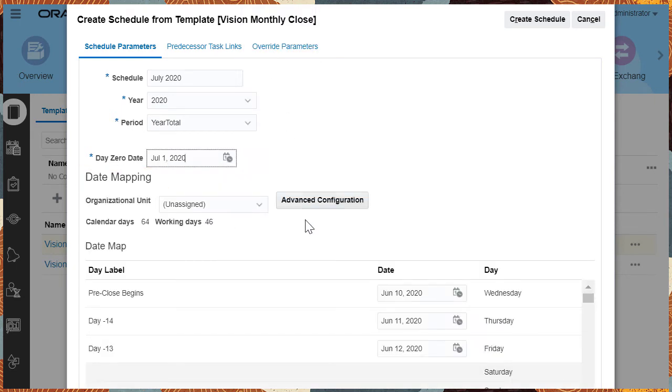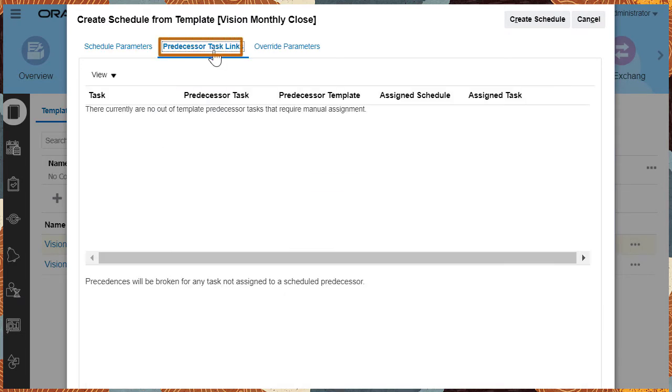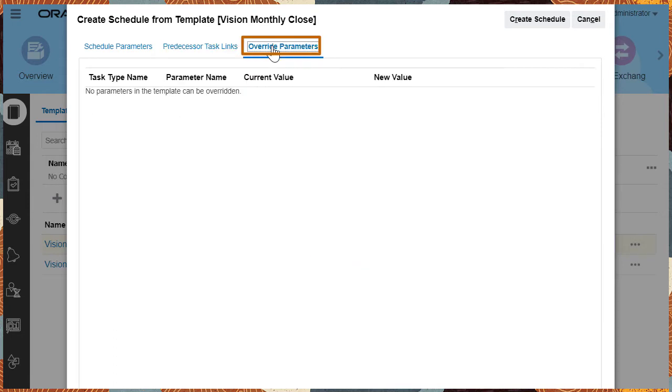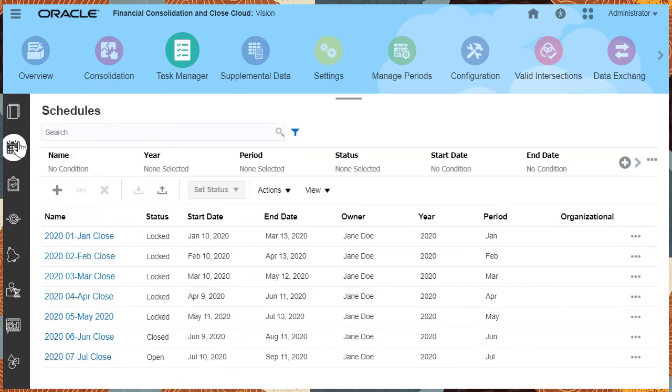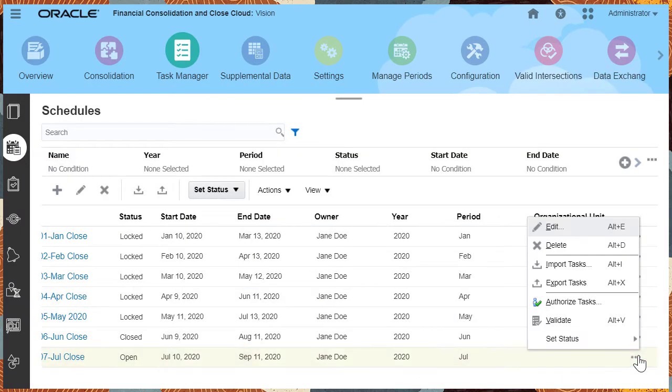If there are tasks that are dependent on the completion of other tasks in other schedules, you can specify them in predecessor task links. You can also specify parameters in the tasks that you want to overwrite. You can create a schedule that's not template-based and load tasks to the schedule using the Import option.